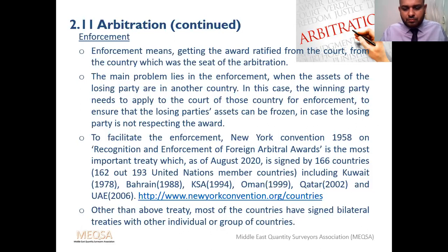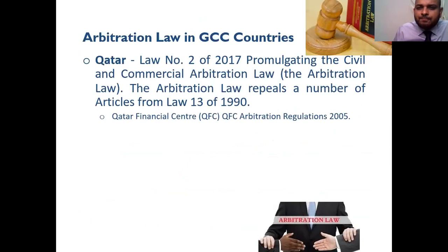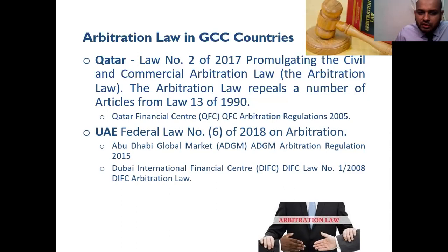Okay, arbitration law. We'll look at what law provisions are available within the GCC countries related to arbitration. In Qatar, Law Number 2 of 2017 is the arbitration law. It has been amended from Law Number 13 of 19, and furthermore Qatar has regulations on top of this arbitration law. The Qatar Financial Centre has its own regulation for arbitration, and UAE Federal Law 6 of 2018 is the new arbitration law. At the same time, the UAE also has the ADGM arbitration regulation, the Abu Dhabi Global Market regulation, and